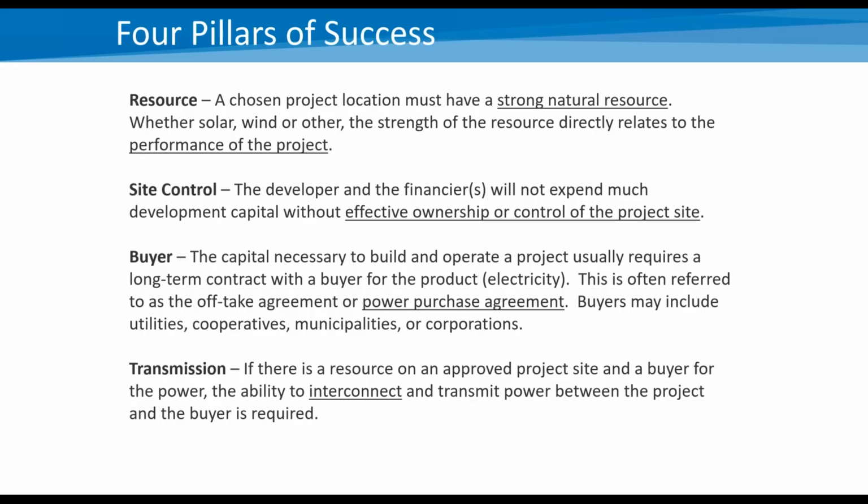And so that's essentially that long-term lease, if you will, covering both the early stage development period, construction, operation, and decommissioning on the other side. Additionally, under the site control, I would say that you have to have the ability to secure the permits that you need. So I kind of include the permitting aspect within the site control.